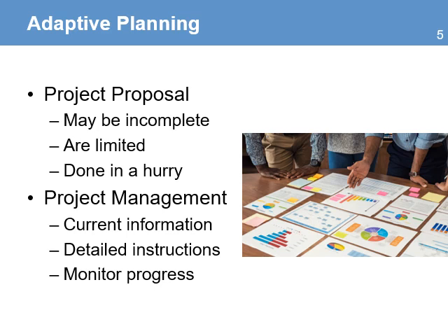Another important consideration is that there could be a significant time from the moment the plans were developed to the time the project is approved, making some of the initial assumptions and suppositions about the context irrelevant. The implementation needs more detailed plans that use more and current information than the team will use to guide their work. The management plans are detailed instructions on how to manage every aspect of the project. They are used to monitor progress and ensure the achievement of the objectives.